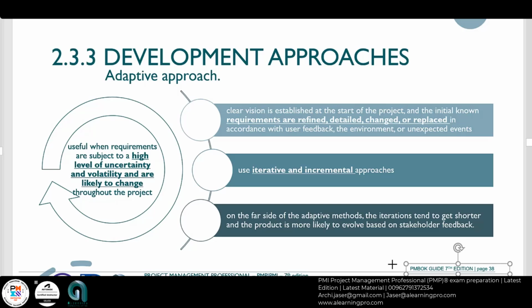If you recall the example of the website that we discussed before, you can start releasing pages. The first page, for example, for mobile back covers. The next month, you initiate the next page for the flip covers. The next month for accessories, the next month for mobile phones, the next month for tablets. So you don't wait until you build the whole website. You release it in fully functional increments, so you start getting customers and payments from customers.